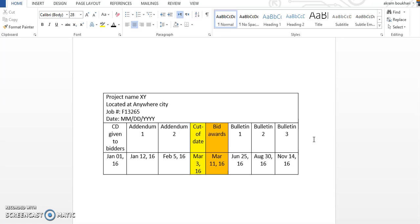But the contractor, before he proceeds in this work, in the changes, he should submit a new pricing to the client and he should get it approved. After getting approval of the price, then he can proceed in the variation order. This is to protect his benefits.